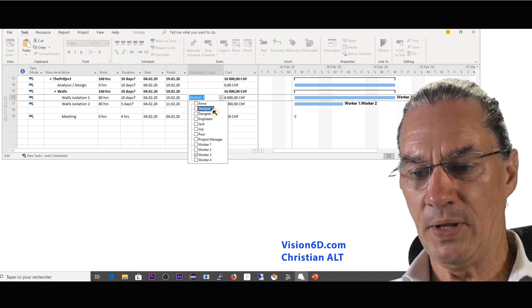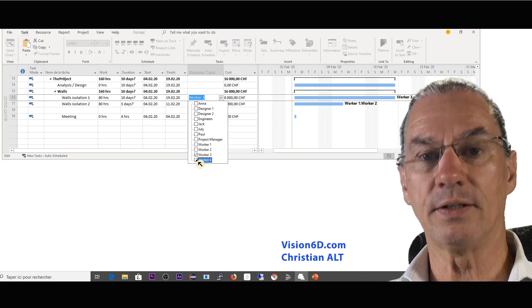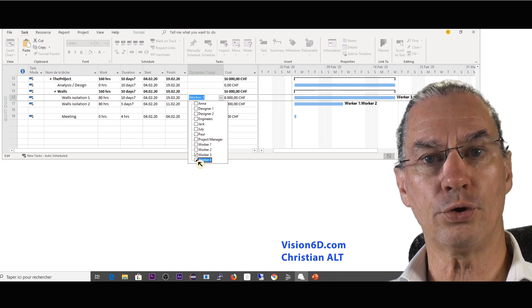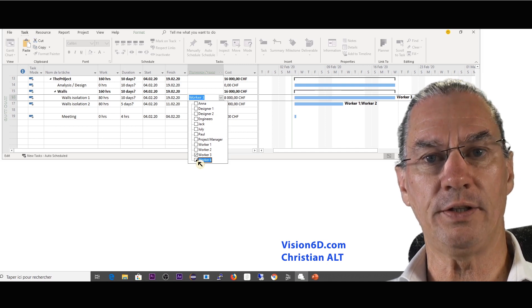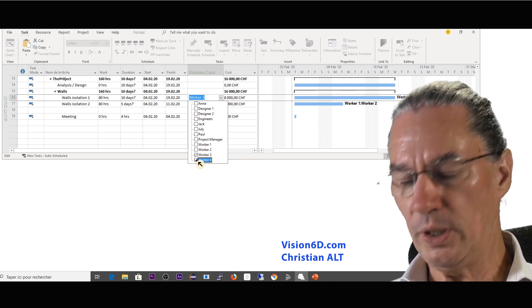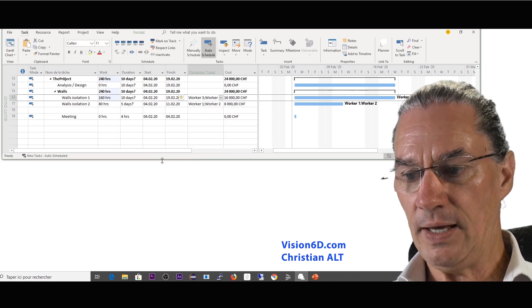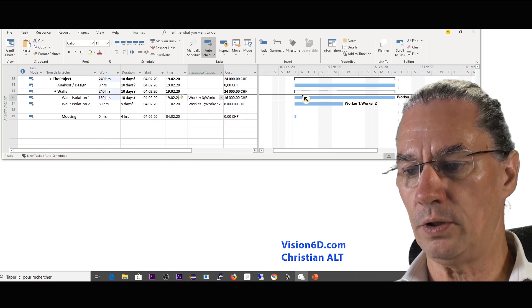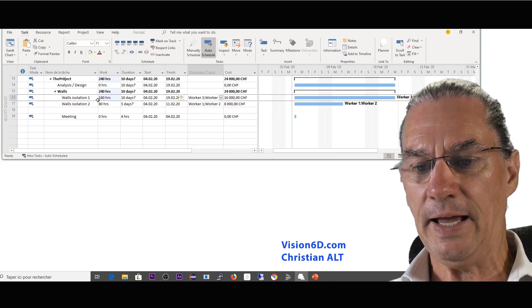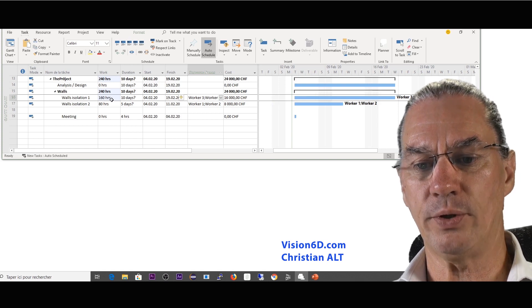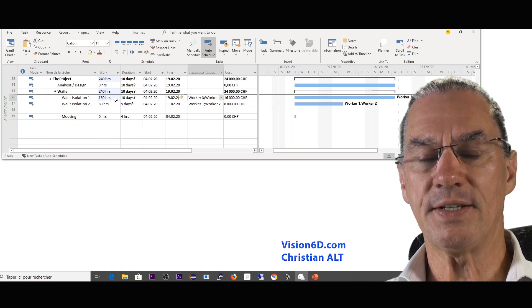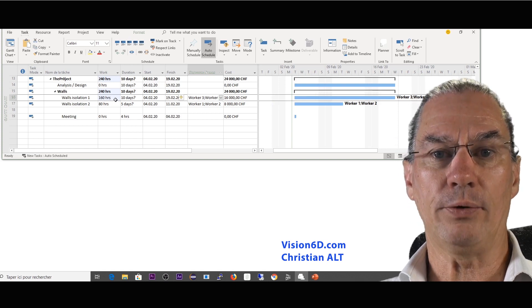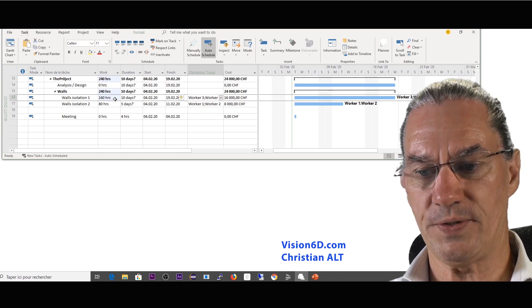So again here I'm going to add worker four in order to shorten it in two and we'll look what happens. And we see here first of all nothing was shortened and we see here that the 160 hours are now the double of the 80 hours.